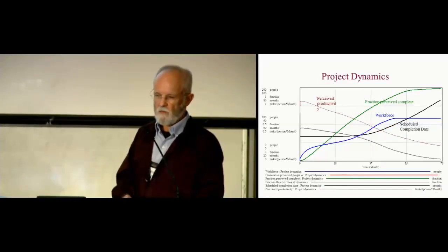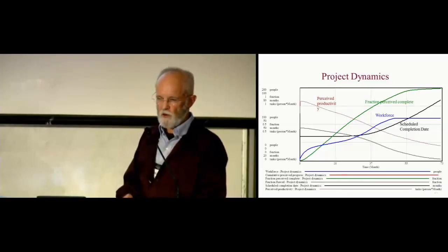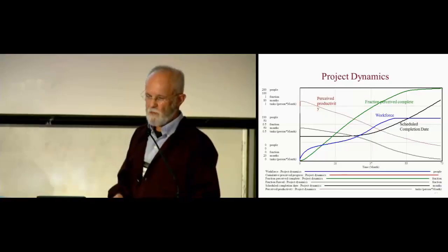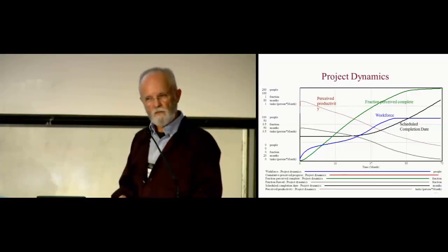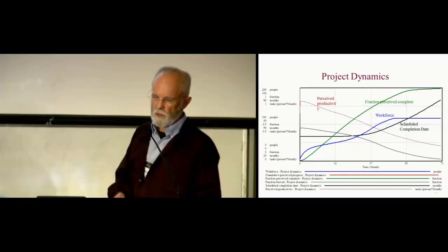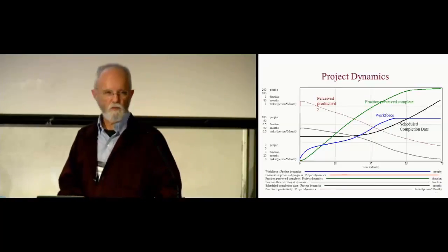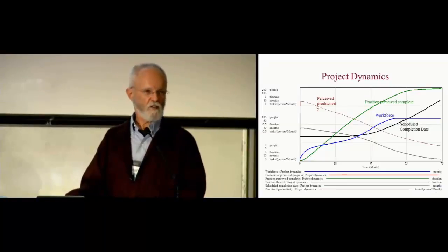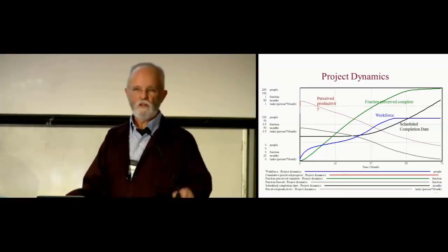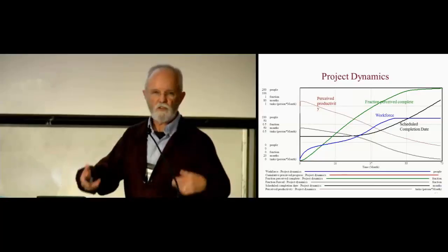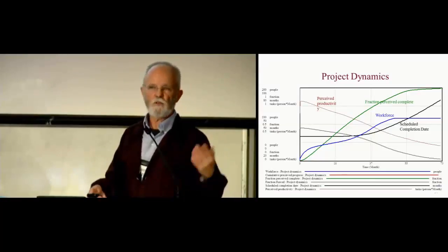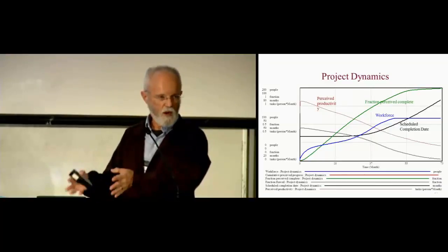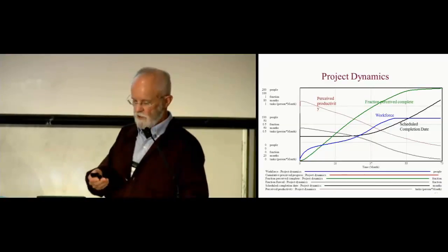And the great picture here is the blue curve for the workforce. They hire the number of people they want, and pretty early on they realize they don't have enough people, and so they have to hire more, and they get to a place where the workforce plateaus. And if you've managed projects, you know why that occurs. You think you're done, or you think you're almost done, so you don't want to bring on new people because you'll just have to train them. So you stop doing that, and yet you have another couple of years of this project to go before you've actually finished.